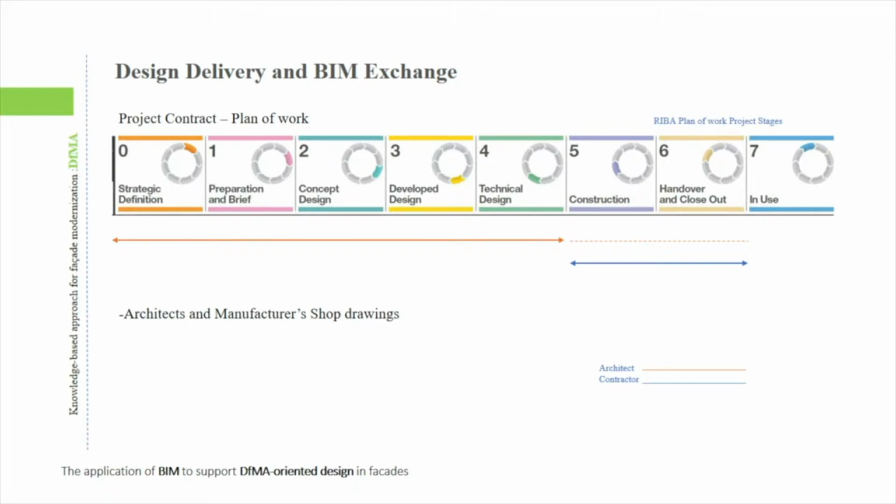During the design and selection of manufacturing components for facades, architects tend to avoid a single manufacturer for various reasons, mainly to allow the contractor to bid for alternatives. And this leads to a break in the data chain from design to installation of products and components when it comes to facades. And it's a waste of time because changing design 3D models, fabrication drawings and design drawings is a waste of material and cost within a project.